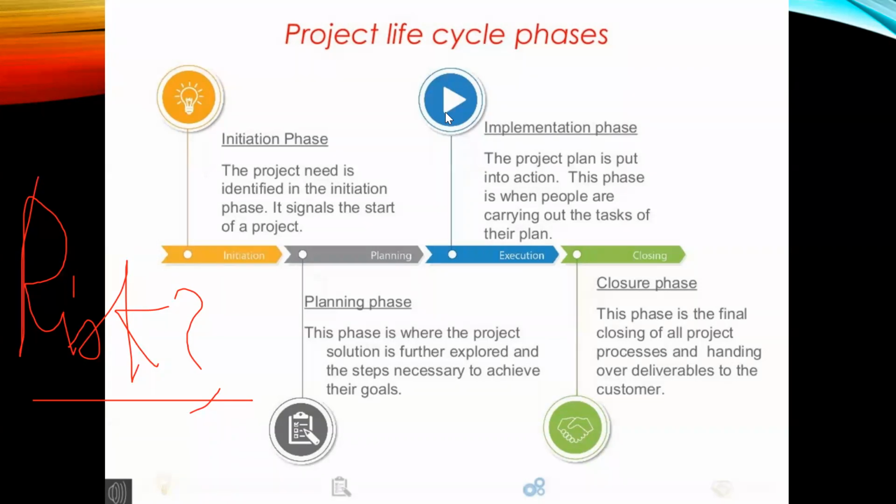If you think about the initiation phase, what is the risk management there? It is the risk that you cannot assemble a team, or you cannot find the appropriate persons to work with you on this project. So this is the first risk that you might face in the first phase, the initiation phase: assembling the team, as an example.